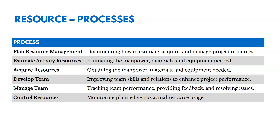Managing the team involves tracking team performance, providing feedback, and resolving issues. Those three — acquire, develop, and manage — are all in executing. And then we're going to control resources, which means monitoring planned versus actual resource usage.